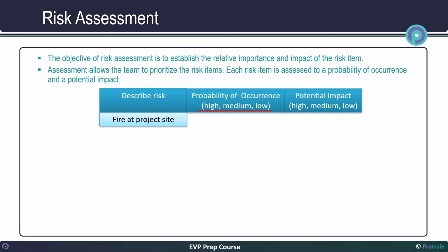This means that while catching a major fire during the construction is not highly probable, however, if this happens, this can cause severe damage as the fire can spread into the existing refinery. So, in the probability of occurrence column, we shall give the risk a medium ranking. As the occurrence of fire can have severe impacts, therefore, we shall put this on the high scale on potential impact.